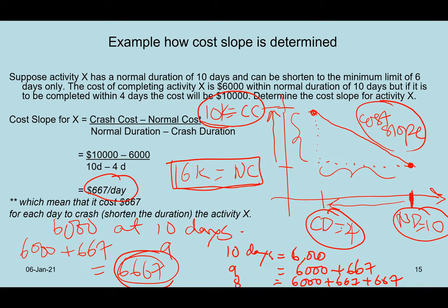10 days. Now I want you to reduce it to 7 days. How much does it cost? So you must have some kind of figure to give to the client or suggest to the client. If the client says, okay, not much increase, I agree. Can you do that? I will pay you extra. This is the concept that we have been talking about.